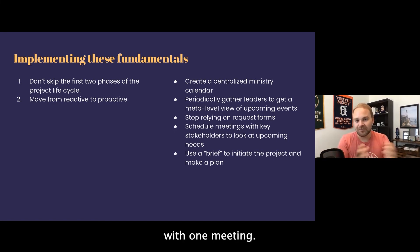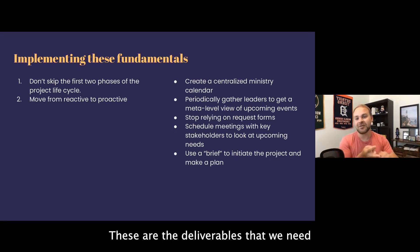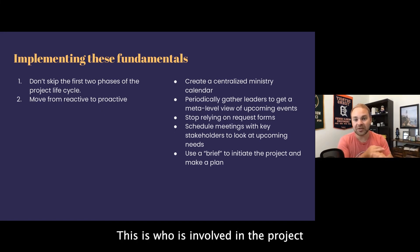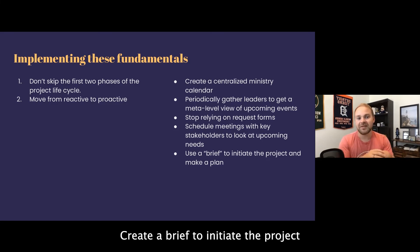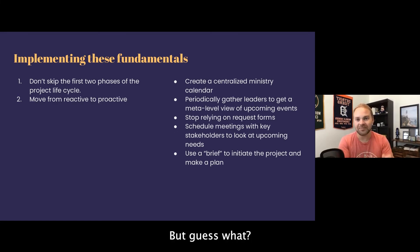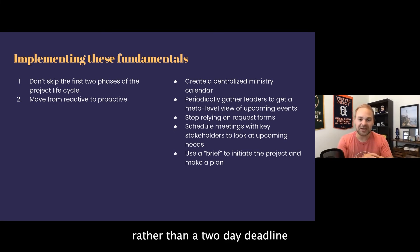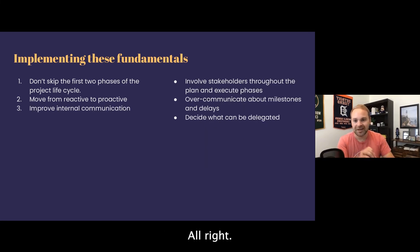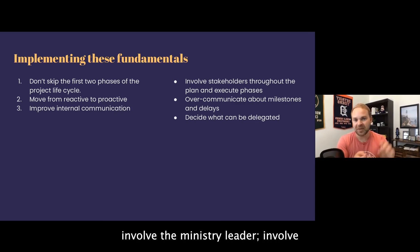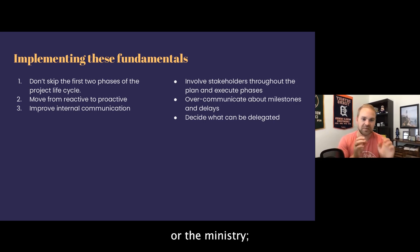Initiate the project with one meeting, and as a result create a brief — one document with all the details: the look and feel you want, the deliverables needed and when, and who is involved at each phase. Create a brief to initiate the project and make the plan, in place of a request form. It is more work upfront, but when you get all the people involved in one space at one time, you're now in charge of the timeline and have time to get things done rather than working on a two-day deadline.